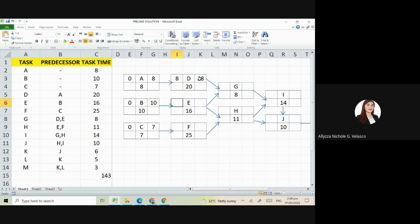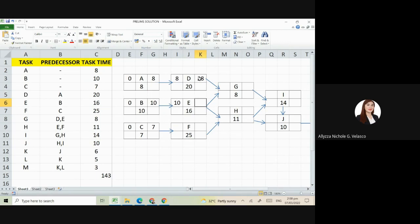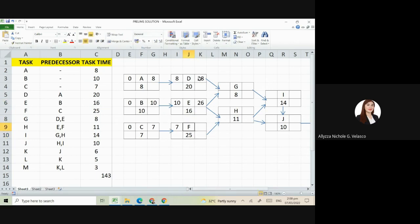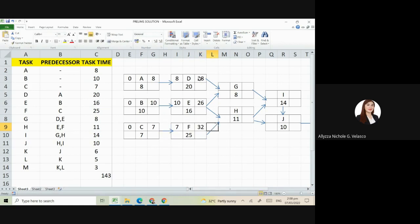Next is E. Its predecessor is B, so this is just copy the 10, the early finish. Copy that to the early start. So here, 16 plus 10 is 26. Next is our F. Copy the 7. So 7 plus 25, we have 32.